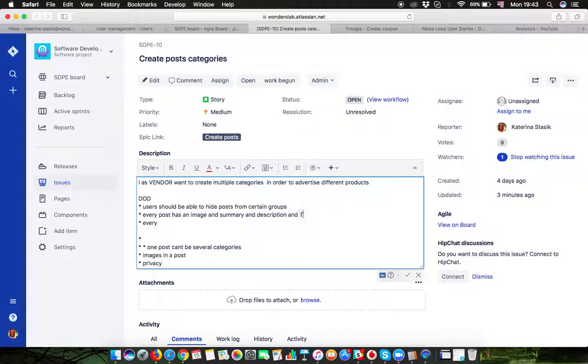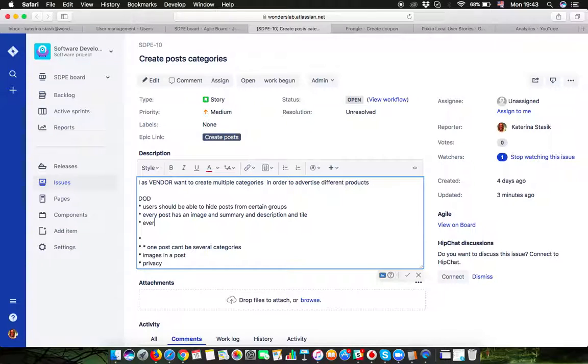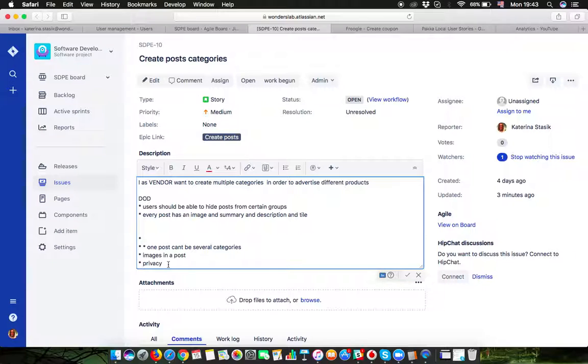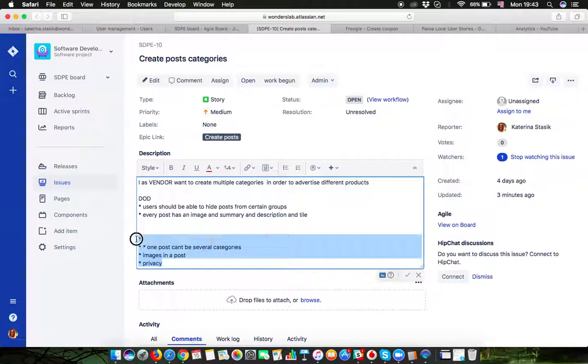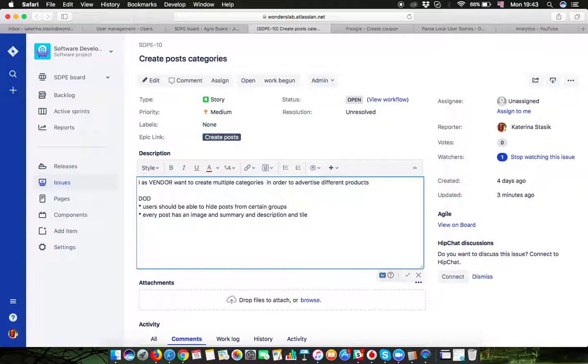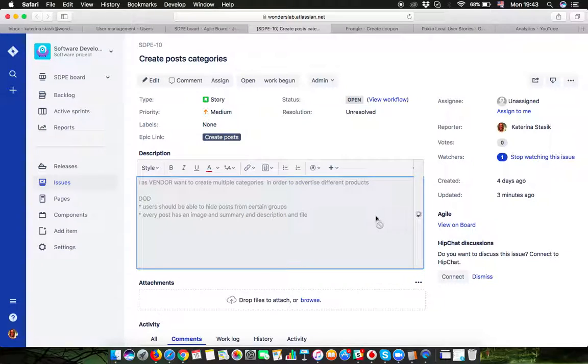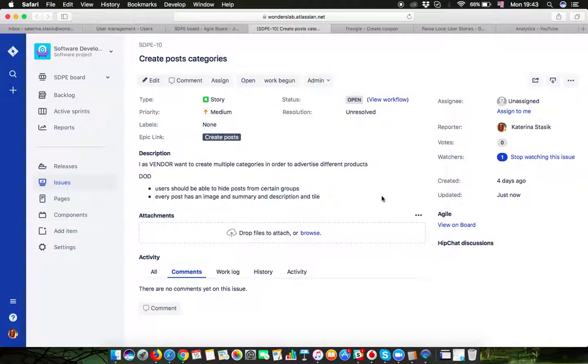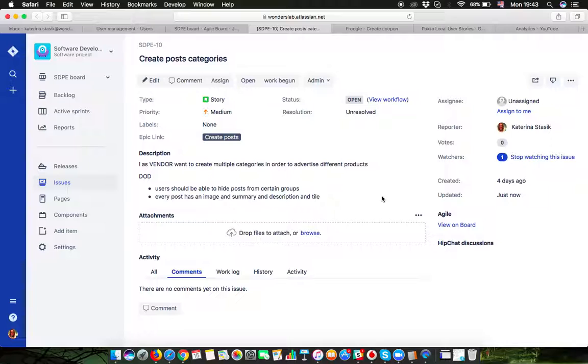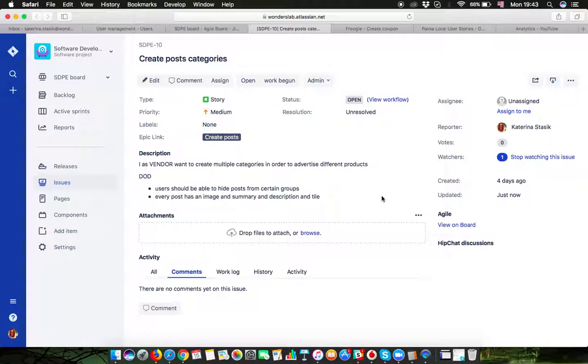That's all the definition of done that I have. I can save my story right now and this is the finished story. This is the complete story which is ready for development. Everything else which doesn't contain a name of a role, which doesn't contain what you need to do, which doesn't contain a result and doesn't contain clear definition of done is a story which is not ready for development.